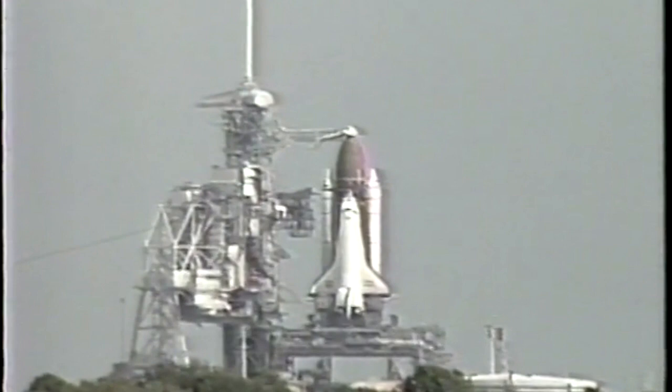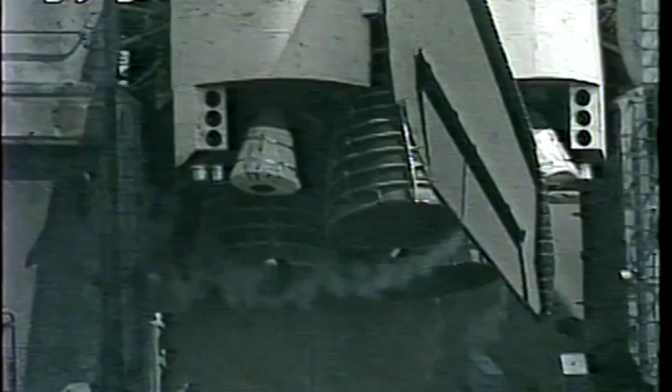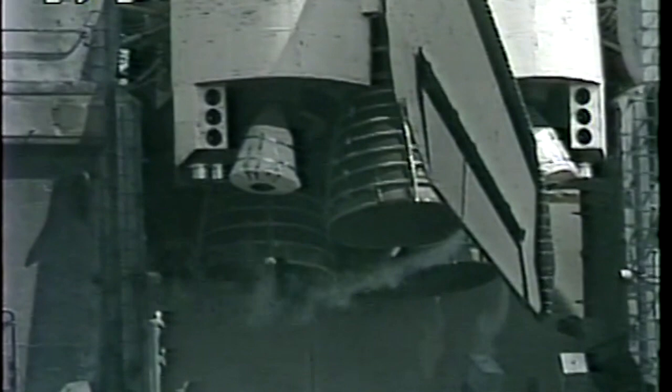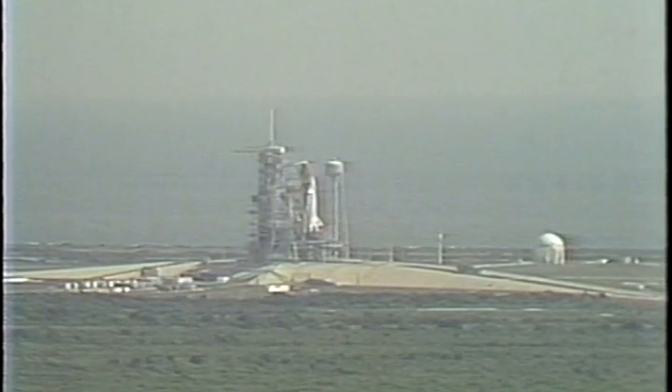T-minus 5 minutes. Orbiter APU start. CAPU OTC, perform APU start. APU copy. Endeavour features the improved auxiliary power units. They also will be tested in the vehicle during today's flight readiness firing. Once we have confirmation of engine shutdown, they will be run up to high speed for just a few seconds to test them in the orbiter.